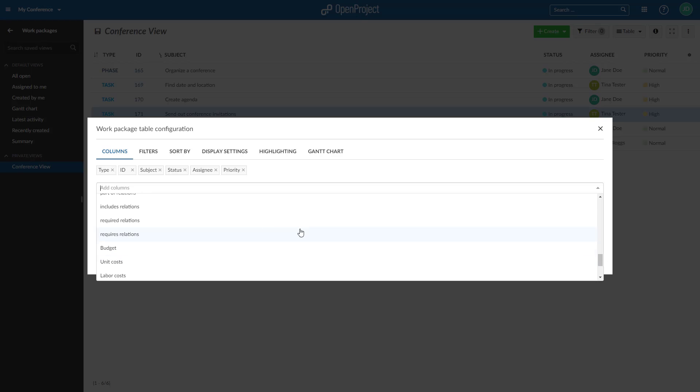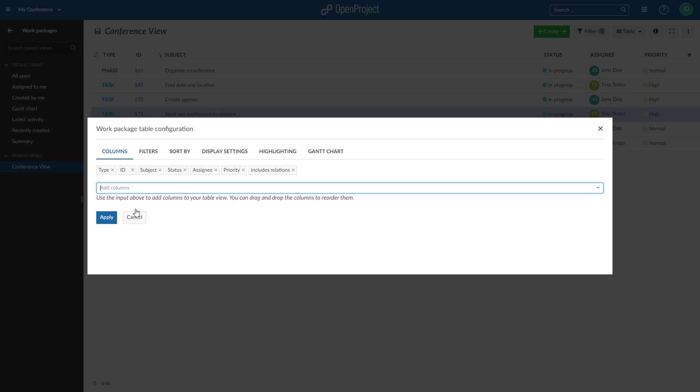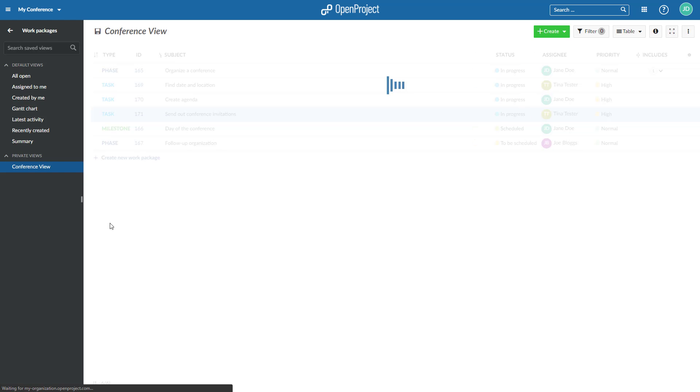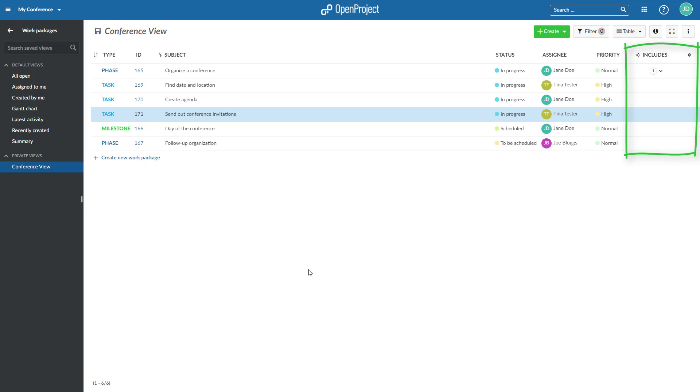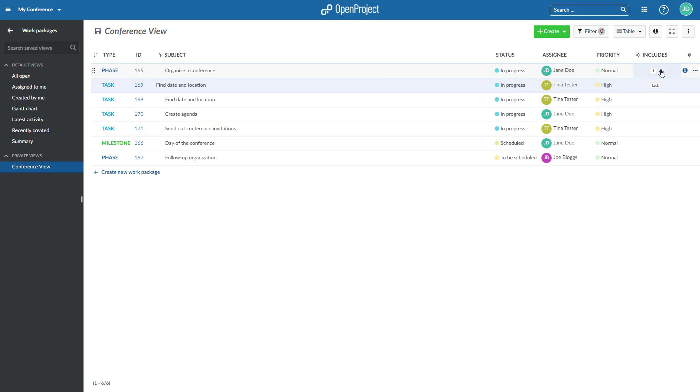The Relations column shows the number of relations each work package has for the selected relation type. In this case, Includes Other Work Packages. You can click on the number to display the work packages which have this relation type.